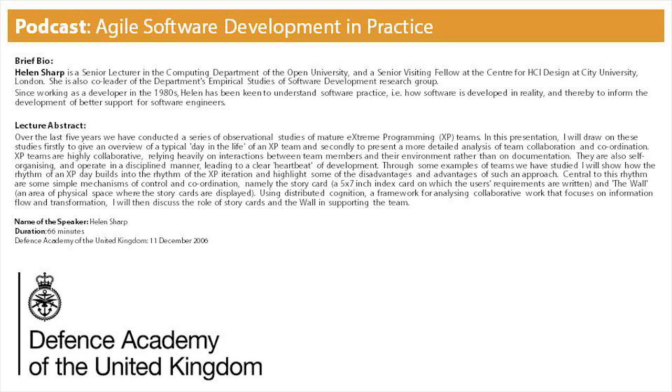That's quite important because the customer, and the customer might be the client, might be the user, might be the person who pays the bills. There's all sorts of different kinds of people, might be hidden in customer. I'm not going to discuss that today because that's a big issue in itself. But if you can just think of customer as being that kind of person, the person who's going to review the system. So it's quite important it's a unit of customer visible functionality because the customer is going to check this every iteration. They're going to get feedback to the team every iteration about what's happening. So it's a unit of customer visible functionality.